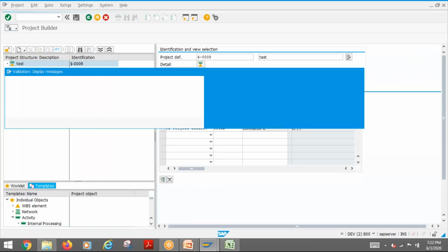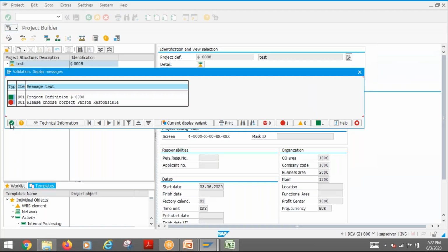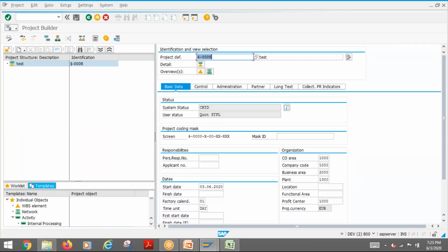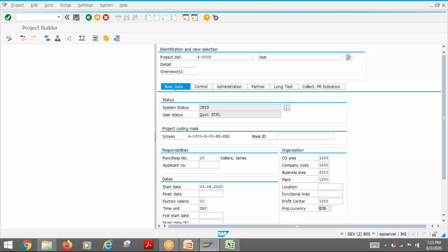Yeah. Abdul, even we can control authorization also with these, right? Authorization based on the partner. Yeah. Authorization. So, for example, person responsible. If I'm making only one person here. No. Then you need to go for that ACL control. If you want that way, at people user ID level, if you want to control authorization, then you need to activate ACL. Okay. Not possible with this partner.